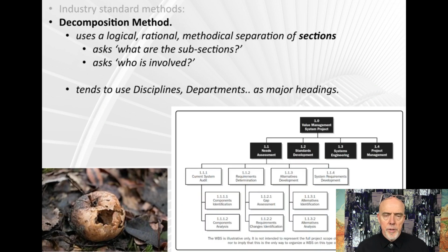Decomposition. What does that mean? If we take this approach, we're working on the kind of project where just a logical, methodical breakdown and a strong rationale will drive it. Generally, we're asking questions such as, okay, what would be the logical subsections, or who are involved? Quite often, as a good starting point, we can break a project out by the different disciplines of people.